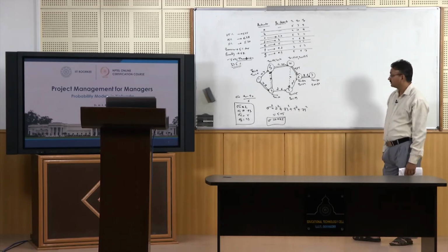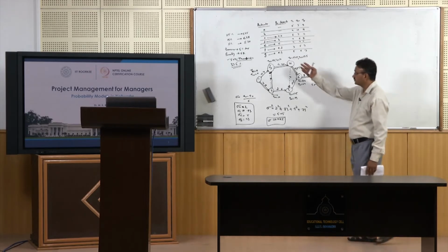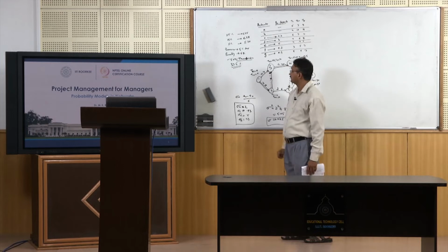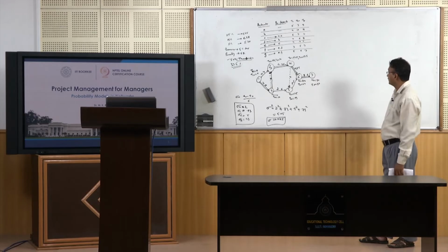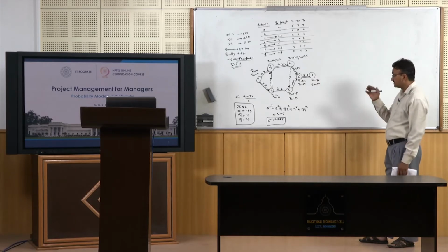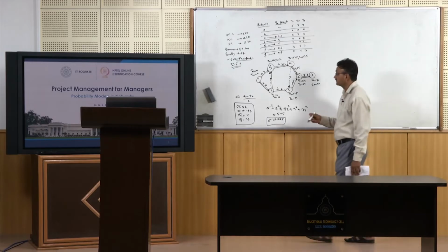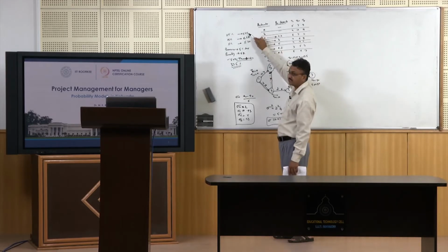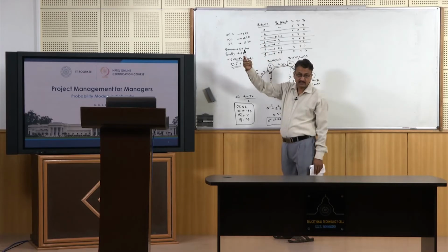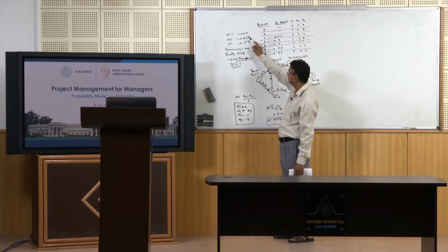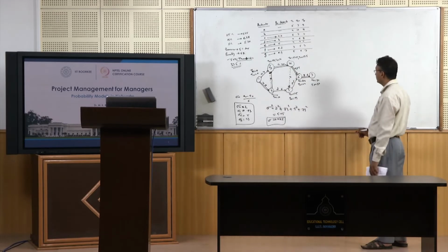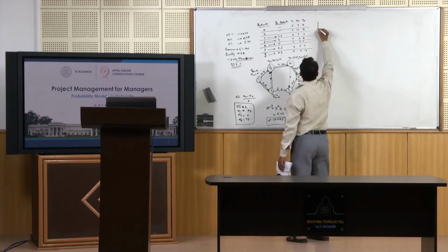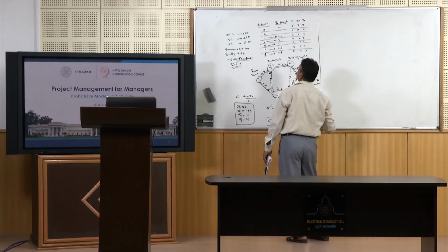Now, let us move further and calculate how much duration we should quote in our quotation, so that we get this particular project. We will have to do calculations at 3 levels. First we will quote 25 days and see what the total penalty or total bonus is. Similarly, for 28 days and for 38 days. First of all we will calculate it for 25 days.